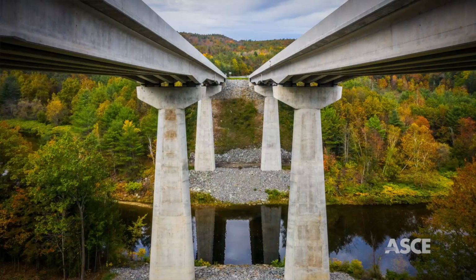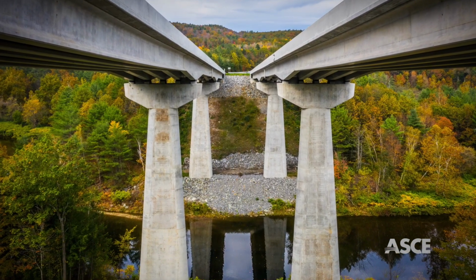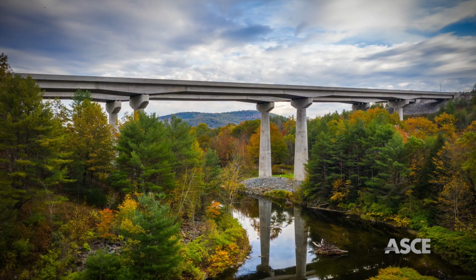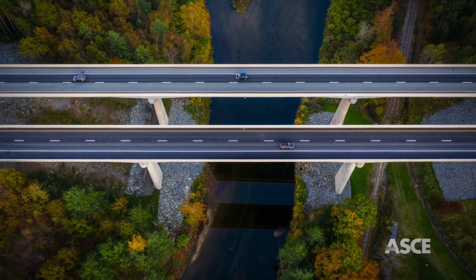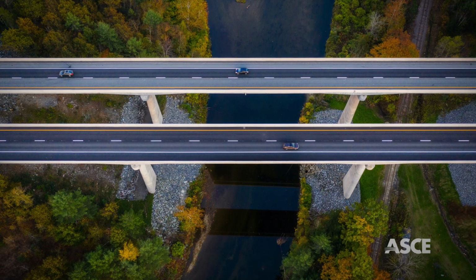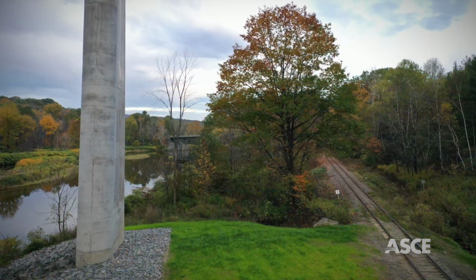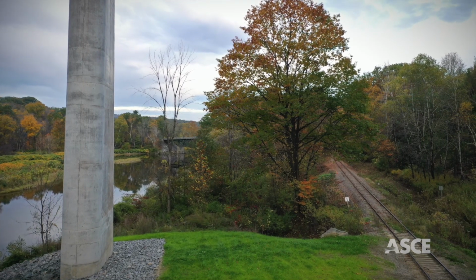The team constructed a 100-year, wider, safer bridge atop challenging topography and 130 feet above an environmentally critical river. The slimmer, sleeker structure beautifully nestles into the Green Mountains. The old substructure was repurposed as temporary supports, allowing traffic throughout construction, and surmounted V-Trans' considerable pier slenderness requirements.